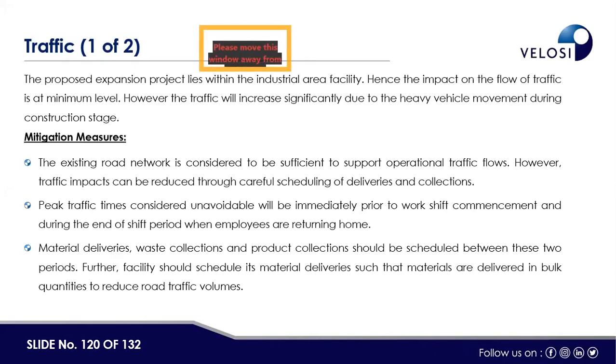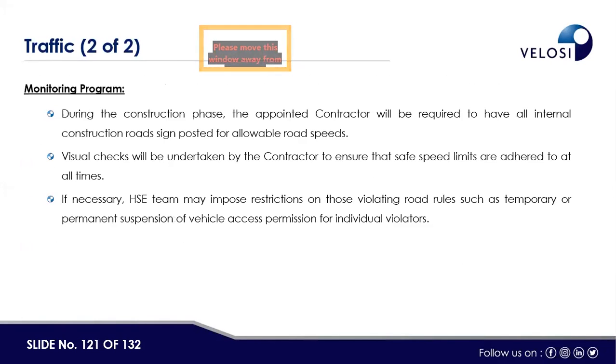The existing road network is considered to be sufficient. Peak traffic time considered unavoidable will be immediately prior to work shift commencement. Deliveries, waste collection, and product collection should be scheduled between these two periods. And then we propose some monitoring program during the construction phase.